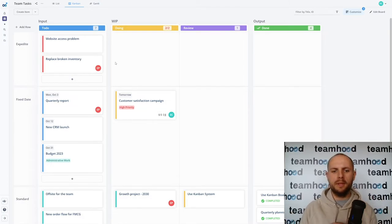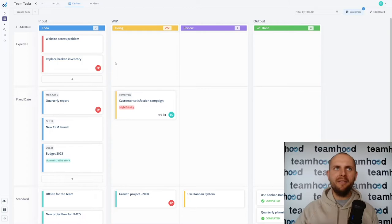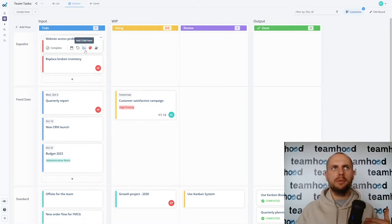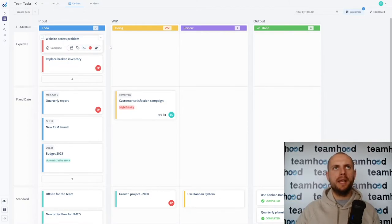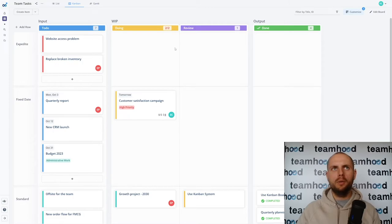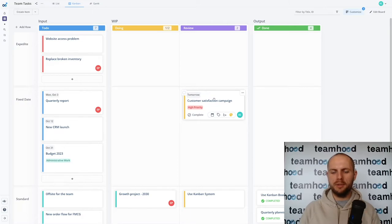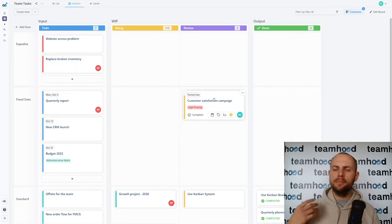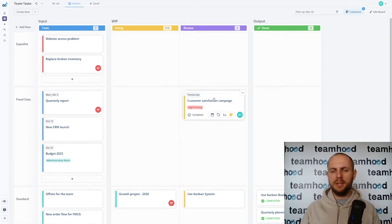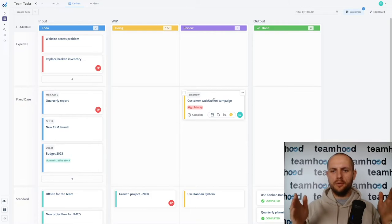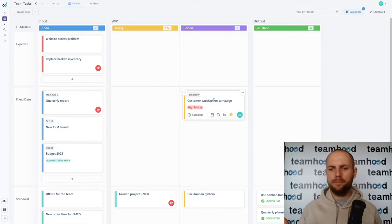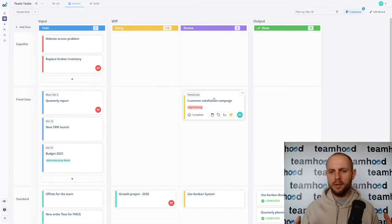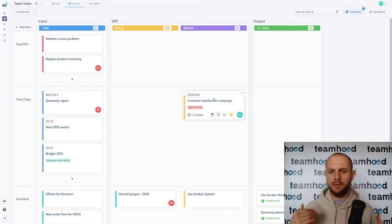But it already brings additional documentation point. If item from input goes into work in progress this is the commitment point, we commit to finishing it. Item can finish only in the review. When the item reaches review stage somebody looks, maybe there is another person responsible for all the reviews. The person either pushes it back or moves it to the completion stage. So this is my commitment point which tells me I should go through at least two steps in this specific status group which is called work in progress.